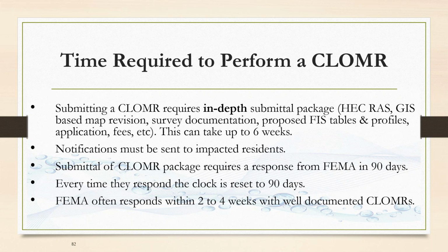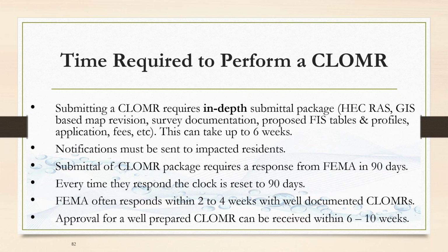FEMA often responds within 2 to 4 weeks with very well documented CLOMARs, and that's what we've seen. They recognize CLOMARs that have been done in a very good way. They can tell it's a CLOMAR done by a company that knows what they're doing. They deal with it differently, because it turns out FEMA reviewers have their own parameters that they have to work within, and it's to their benefit to move these through quickly. They benefit from that. So that's why we want to make sure the CLOMAR package is very well done before it's submitted the first time, if we want to get this done in a timely fashion.